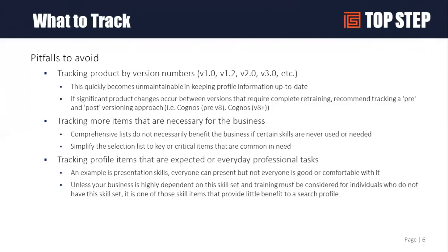The typical use for a skill profile is: I need someone who knows this. I need to staff a project with somebody that knows this. So what you need to look for in the organization tends to drive the skill profile. Things that everyone should do as part of their normal job — don't put that in a skill profile. For many services firms, a soft skill like presentations is something you handle through professional development and not necessarily track in the skill database of OpenAir.